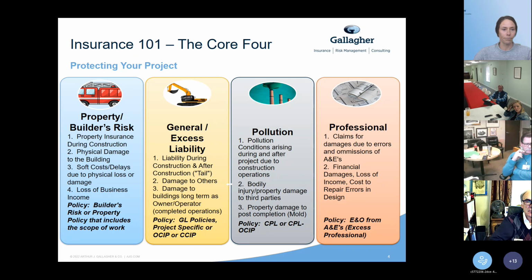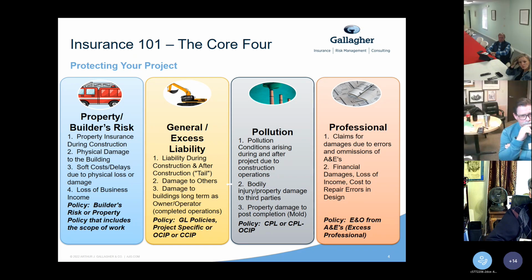And the first one, which John mentioned earlier, is the builder's risk policy. So builder's risk is very unique insurance for construction because it covers the construction project itself, and not just when the building starts undergoing its renovations or the project actually gets started, but builder's risk covers the materials, the supplies, and any equipment on site, or materials and supplies that may be in transit.